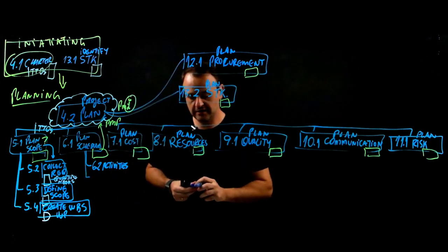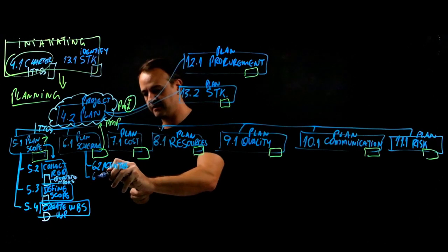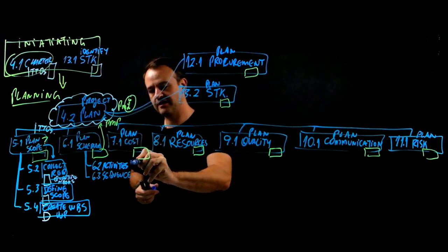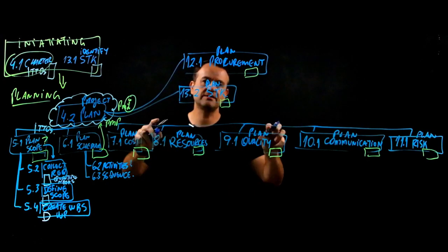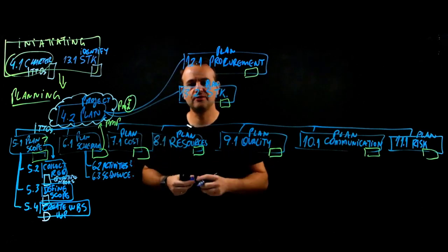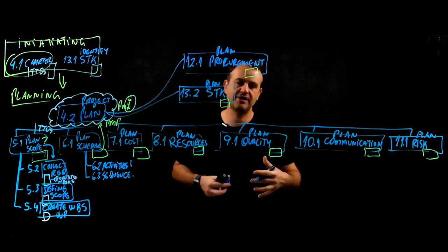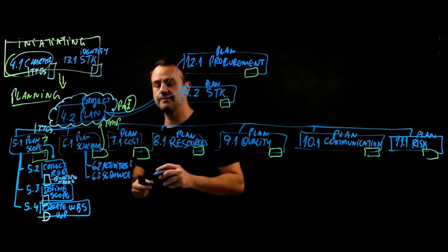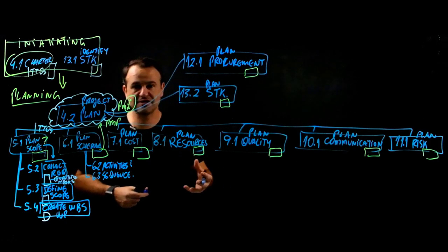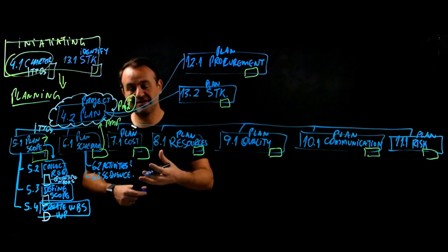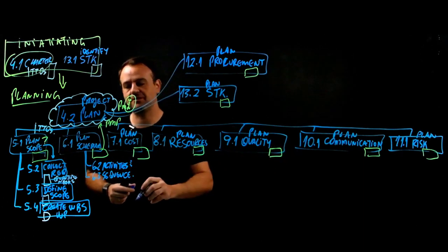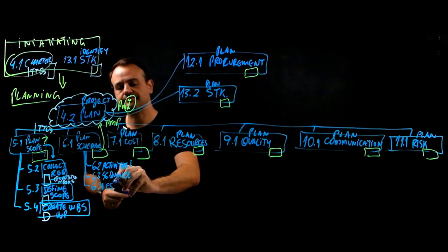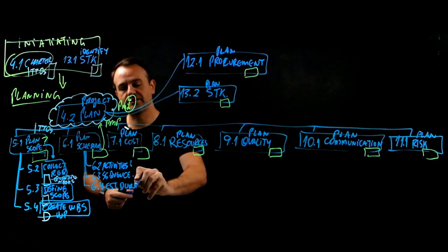And once we have the activities, the next step is to sequence these activities. So we have an activity list, as you can imagine, and then we are going to sequence, which means I can have two tasks that initiate together, finish together. You finish one and you initiate the other. So we are going to create a sequence here, which is related to a very important concept in project management. We call it the critical path, so that we know the duration of the project. And the duration of the project will depend on estimating the duration for the tasks. So estimating duration.